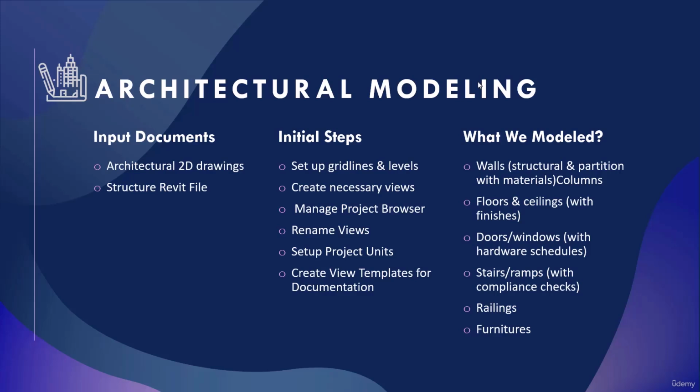That is, they are connected to the walls. On top of that, you first come and model your shelf wall. Then you come and model your floors. You model your cabinets. You show the doors and windows. You pull the pillars. You pull the ramps. You pull the curtains. You put the furniture, and finally whatever you need. And your architecture modeling is also complete.